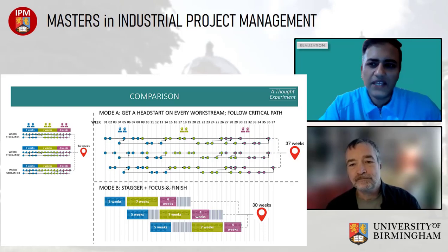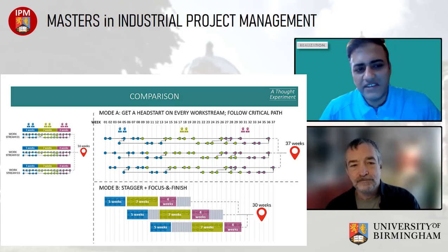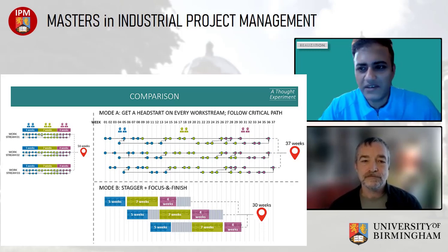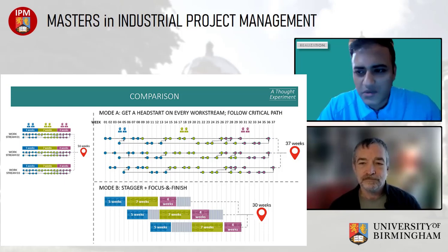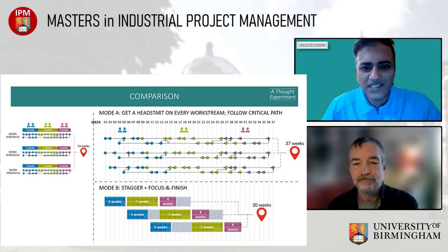And so what we proposed was about the problems that are coming because of multiple things coming together. So this can be two drawings that are required to make the third drawing, or in civil works, we need to do piling, and in order to do pile caps, we need the piling to be done and the pile cap drawings also to be available. So wherever multiple things have to come together, that is the most risky place for resource shortage to hit. And that is what runs away, as we are also seeing in the after picture, that all the places where things have to come together are generally running away. This is the problem we wanted to avoid.